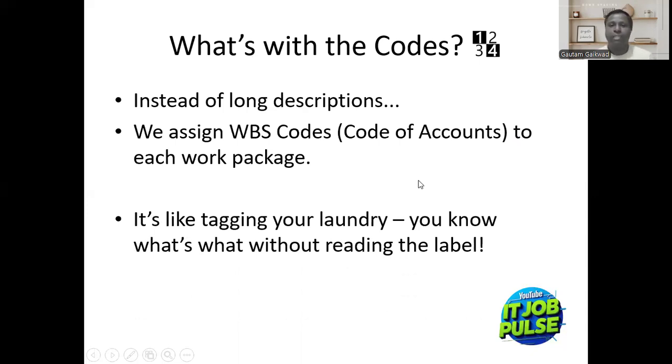So let's consider an example of giving a code. We are building a website. I talked about designing a home page. So it will be 1.1.1. That is the code. That is nothing but the work package. Work package gets a code.